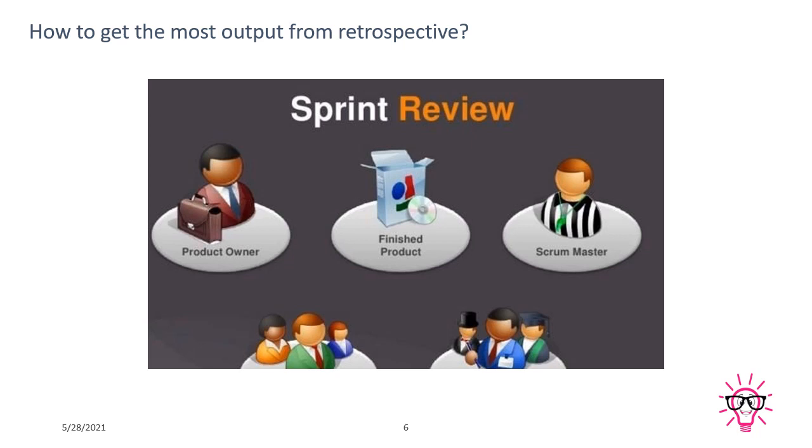Now collect the action items and also distribute those action items with particular names. For example, a few action items go to supporting team members, a few to the technical architect, maybe to the product owner, maybe the scrum master, maybe the agile coach. Just write down their names and tell them that in the next sprint we will try to avoid these cases, we will try to avoid these situations.